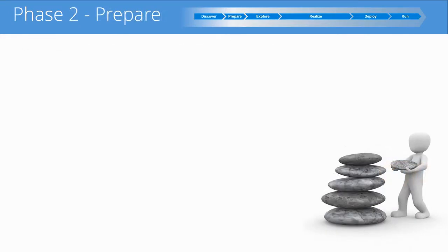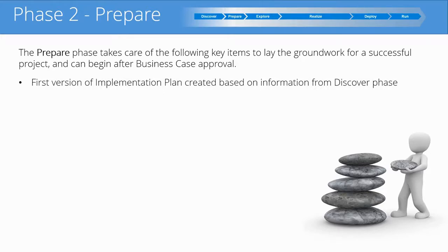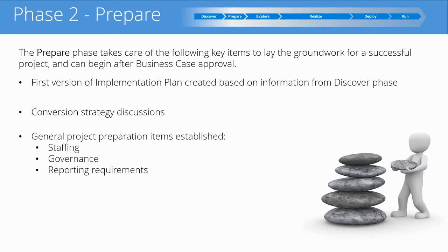The second phase in the Activate implementation is Prepare. In the Prepare phase, we take care of the following key items to lay the groundwork for a successful project. This begins after the business case generated at the end of the Discover phase is approved. The first thing we do is create an initial implementation plan based on the information from the Discover phase. We have discussions on the conversion strategy — how we are going to get from where we are now to where we want to be with S4 HANA. The general framework of the project is settled in terms of staffing, governance, and reporting requirements to management.